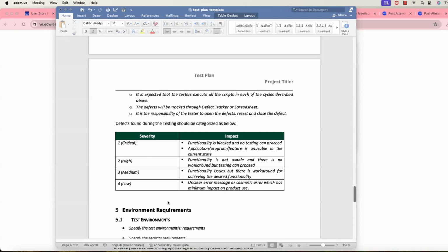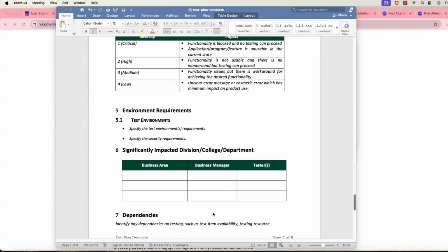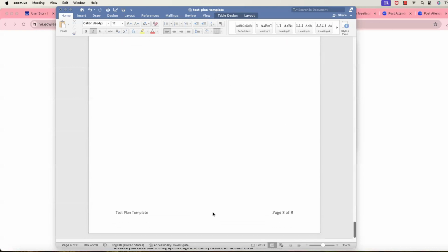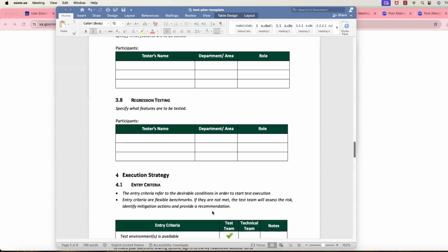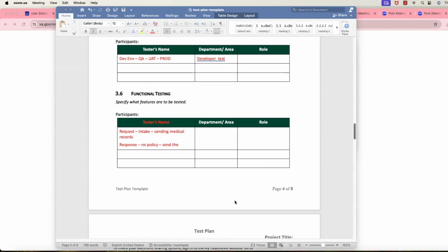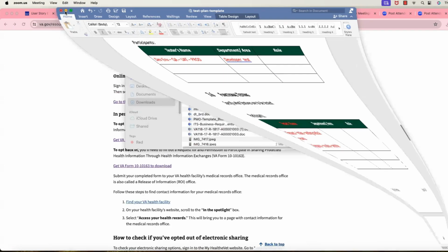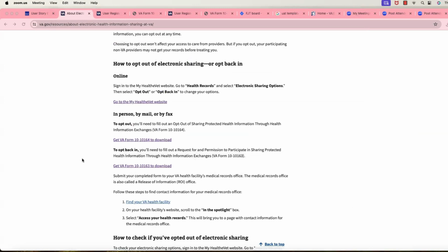So like this, you have to understand the different types of defects and their severity, and you're going to fix the defects before we go live. Also we are going to get the sign-off. Once you give this document to them, and the business owners are happy with all this testing, you get the UAT approval. Once you get the approval, only then can this project go live. So this is end to end.